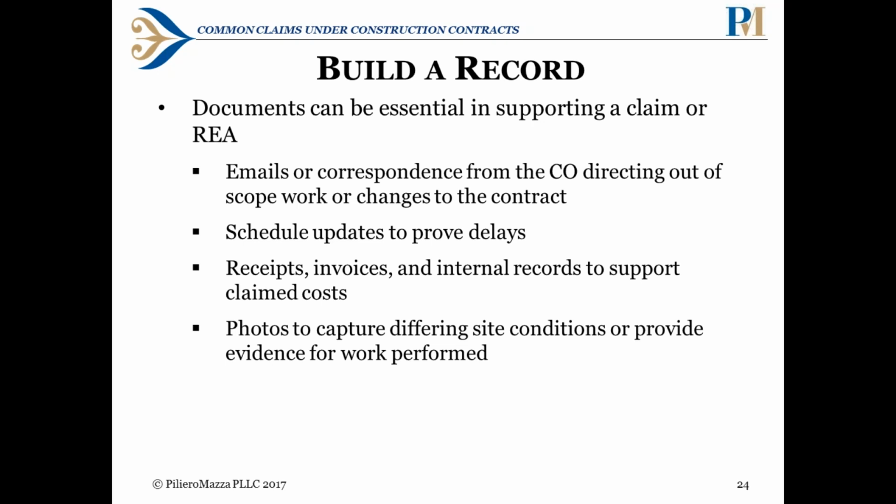It can consist of receipts and invoices and internal records to support your claimed costs. You can't just come up with a magic number for the costs that you've incurred. You do need to have the backup documentation to show that those amounts are valid.